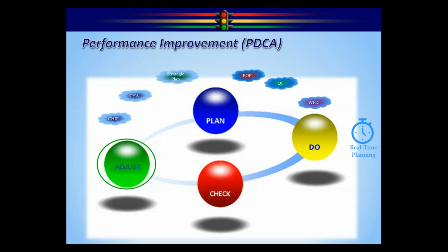If it's possible to adjust the resources, we could potentially add more resources to get in here. So one of the things we had was the training was face-to-face training at the schools. Well, nobody's at the school, so that doesn't work. Maybe we could convert our training to a virtual-based training, so Zoom or something like that, and be able to take the training to the students at home so we can get back on track with the training. The other thing we might be able to do is get somebody external, maybe through some grant funds, we can hire a contractor to go out and contact those other 5 tobacco vendors.